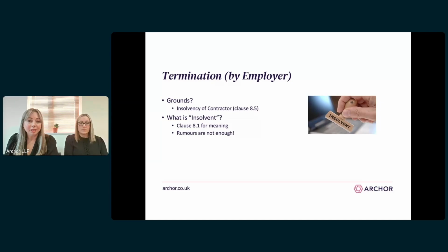An employer cannot terminate for insolvency just because the market is rife with rumours that the contractor is going to go bust. So if the employer does this and the contractor hasn't yet entered into any insolvency action, then the employer is likely to be in breach and there will be a wrongful termination. What this will mean is that the contractor, or rather the liquidators or administrators of the contractor, because let's face it, the rumours are often true, will go after the employer for damages because of this wrongful termination. Employers don't want this to happen, so it's vital you check the legal position of the contractor before terminating for insolvency.